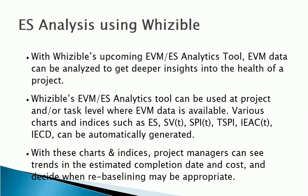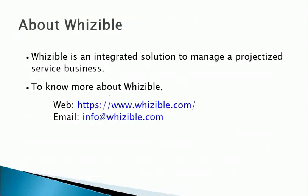Summary data such as periodic and cumulative ES, SVT, indicators such as SPIT and TSPI, estimates like IEAC(T) and IECD, and charts are available to be made part of periodic monitoring and reports. With these charts and indices, project managers can see trends in the estimated completion date and cost, and decide when re-baselining may be appropriate. Visible is an integrated solution to manage all aspects of running a projectized service business. To know more about Visible, please visit www.visible.com or email info@visible.com.